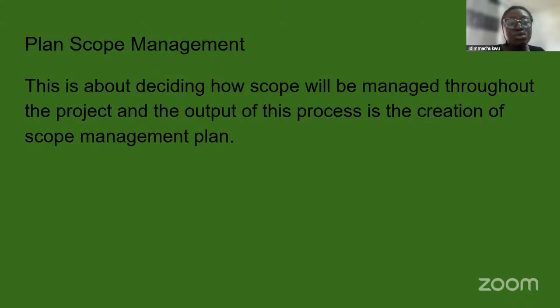Is there need for me to create a change control process? Do you need it? If you need a change control process, then you need to add it to your document. A very simple change control process is, for example, if a stakeholder comes in during the execution phase of the project to say, there's a requirement I need to add, and this requirement is very important. There's this feature I want you to add to my app or to my website. They need to go through the change control.